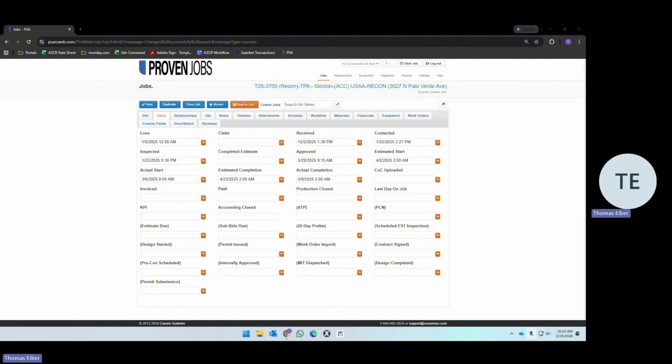Who uses these deliverables? Project managers use the direction and schedules to plan their site visits. They already have some jobs that they're currently working on, so anything added to their schedule, they're going to plan around. So you need to make sure your schedule is accurate. You're not giving them an hour and a half for a $1,000 job unless there's a lot of travel time. So you account for the travel time in between. You make sure that the schedules you're giving them are accurate and the scopes are accurate. You're communicating with them so they know what to expect and they can plan their day accordingly for additional site visits for their other jobs.